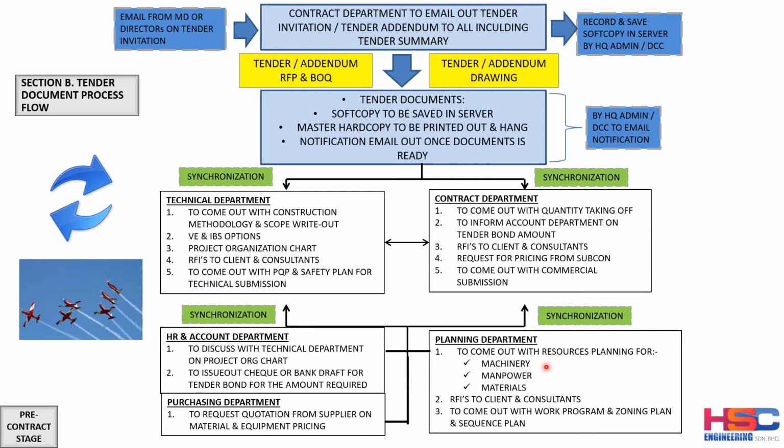And once they have the activities defined in the WBS, they need to figure out what the resources required are and what the sequence between the activities is, and they need to put in the duration for each activity. Once the duration has been set up, they need to come up with the program.